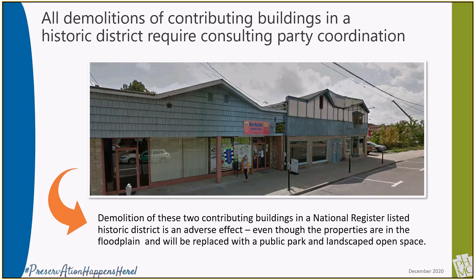All demolition of contributing buildings in a historic district requires consulting party coordination, even when the project is not controversial. This project to replace these flood-prone buildings with an expanded green space and public park was much supported in the community. None of the solicited potential local consulting parties elected to participate. The consultation was still required with the SHPO, federal agency, grantee, and local municipality. The nature of the project meant that the mitigation discussions had to address how to integrate this newly expanded open space into the historic district.